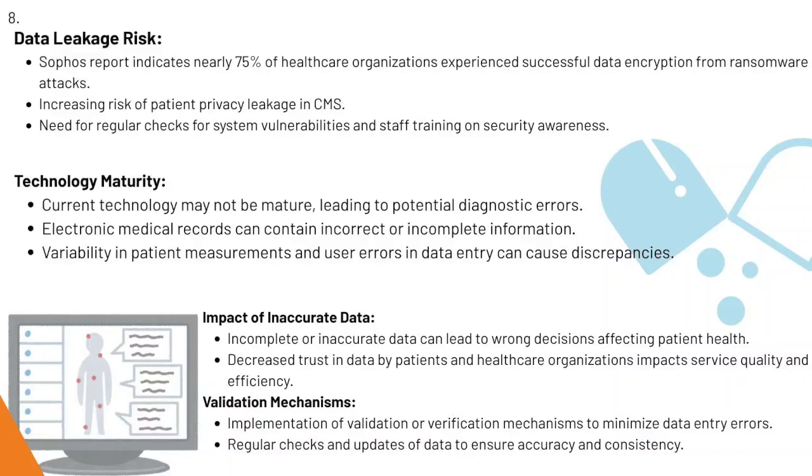Technology maturity and errors. The technology is still evolving, leading to potential diagnostic errors due to incorrect or incomplete information in electronic medical records. Variability in patient data and user entry errors can cause discrepancies, compromising patient health and trust in healthcare service. Implementing validation mechanisms and regular data updates is crucial to minimize these errors. In conclusion, while CMS can enhance hospital operation and patient care, they also present risks of cyber attacks and data inaccuracies.